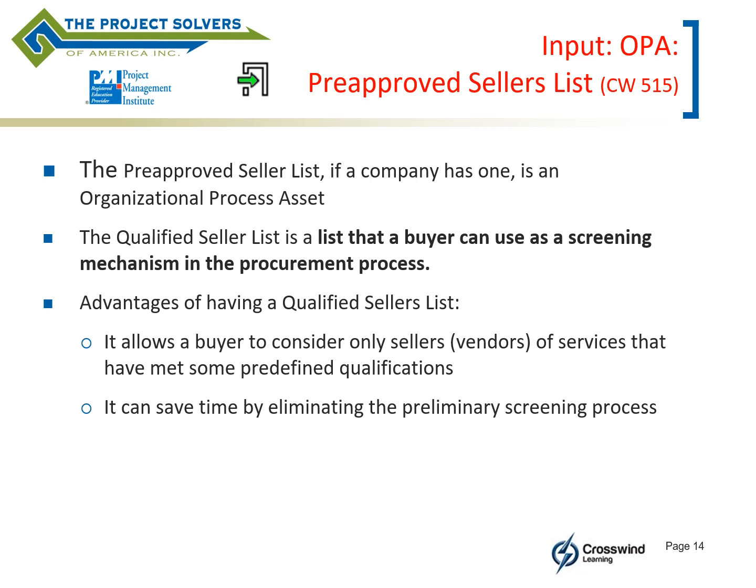So a little bit more on that pre-approved seller list or that qualified sellers list. It is a screening mechanism that's supposedly supposed to save you time. The problem might be, of course, that maybe your list may not be as comprehensive as it could be, or might not have been scrubbed in a while, and so you always have a potential there that it could be problematic. But ideally, it will save you time because these vendors have already been researched and vetted.